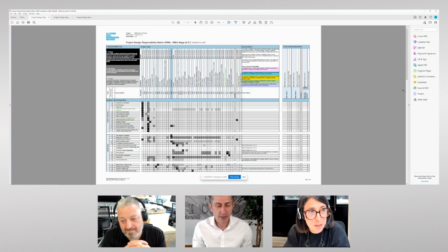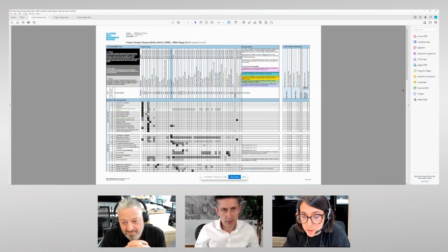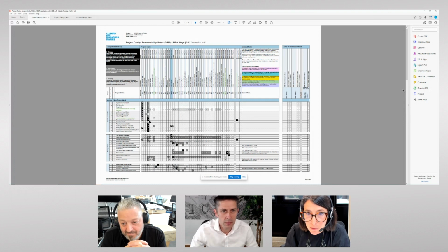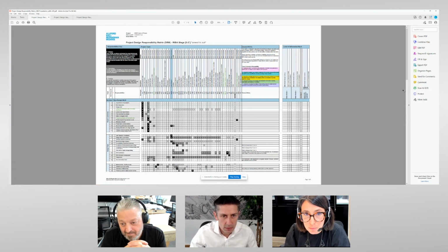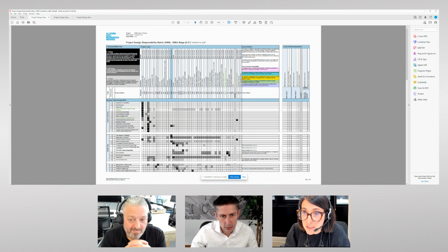Sure thing. This is our AHMM default project design responsibility matrix, which we use as a tool to minimise ambiguity by determining the level of input required by each party and what responsibility they have. So our particular template defines the responsibility, whether it's a primary, secondary or tertiary responsibility. It also sets out the level of specification, effectively the CDP level for each element.